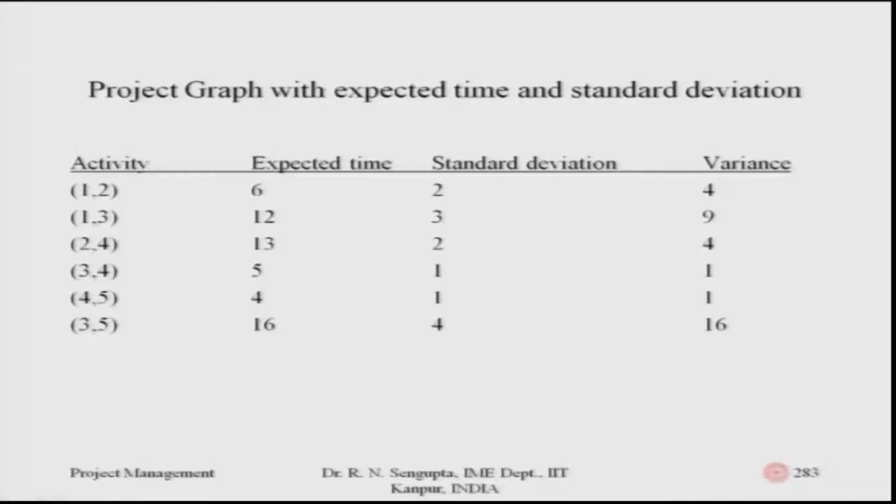So, simulation concepts can be utilized to find out which jobs and activities appear the maximum number of times as you do the simulation, and then you find out the average time based on which the overall project would be finished, such that that is the expected time, and then we find out the variances accordingly.